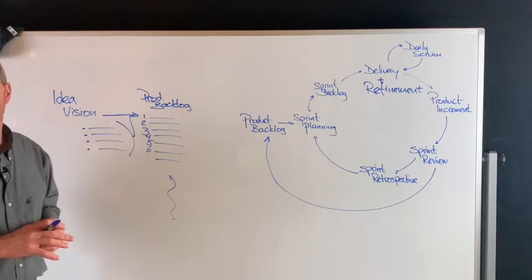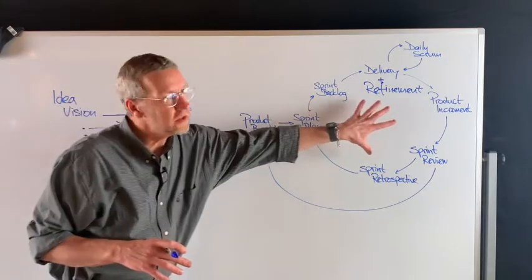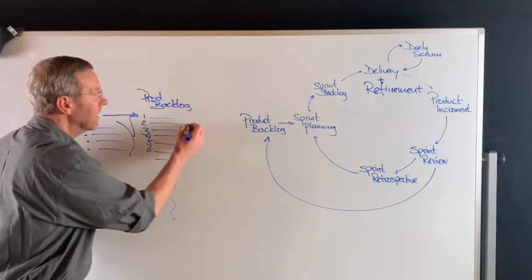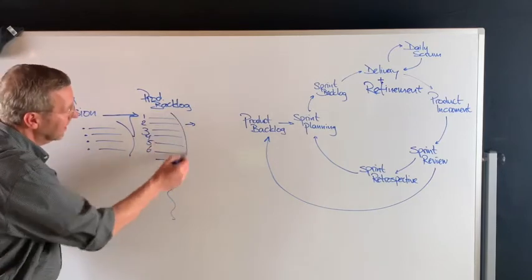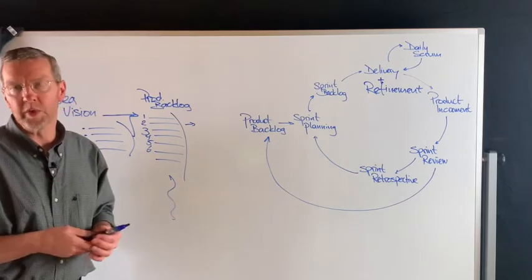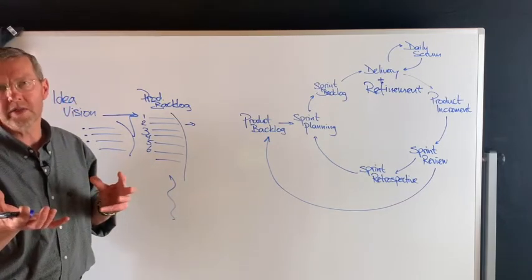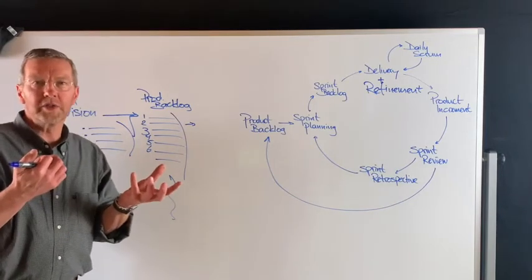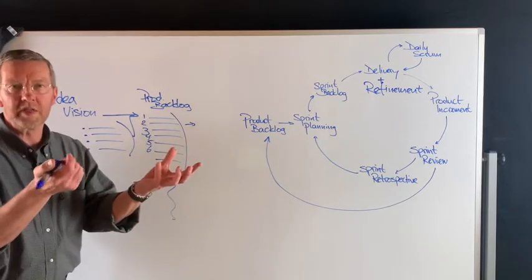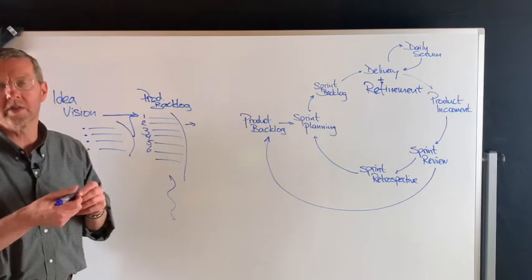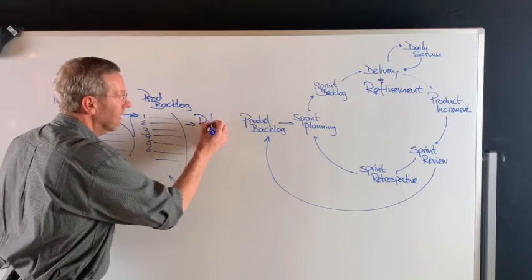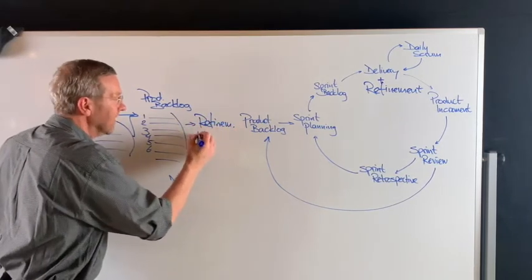The focus is clear. Now bring the engineers who will build into the discussion and run another refinement, but do that refinement only for the top of that list. I like to have a scope of about 3 months' worth of work. It's fairly stable, 3 months. It's not too much work, neither too little. So a good balance between what is stable and what gives enough insight for the engineers about what's going to hit them in the next couple of months. So that refinement with all the engineers